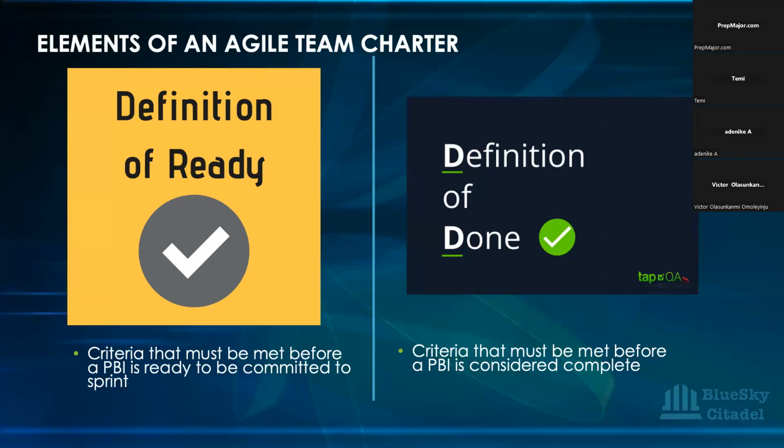This would really help your commitment reliability. If you just put different types of product backlog items into the sprint and start working, maybe you've committed 20 product backlog items, and in the course of the sprint you see that you are dependent on a lot of people, or you realize that these stories are not clear. We don't know what we need to do. The user story is not properly written. So why is it there? Then maybe you are even blocked.